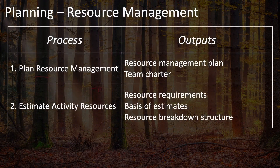There are two project management processes in the planning process group and the resource management knowledge area. These are plan resource management, which has as its primary outputs the resource management plan and the team charter, and the estimate activity resources process, which has as its main outputs the resource requirements, the basis of estimates, and the resource breakdown structure.